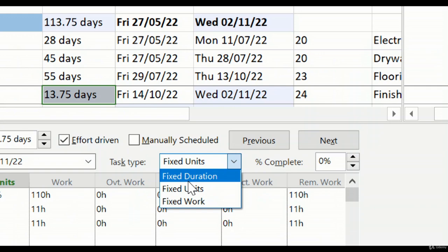If a meeting is, let's say, 2 hours, and you have to present something to your client, then as you add many people to the meeting, the number of hours for that task is not going to reduce. And by nature, if you add people to the meeting, it might even take longer. So it's not going to help reduce the duration of that task. That's the fixed duration, one task type that you can define for your task.